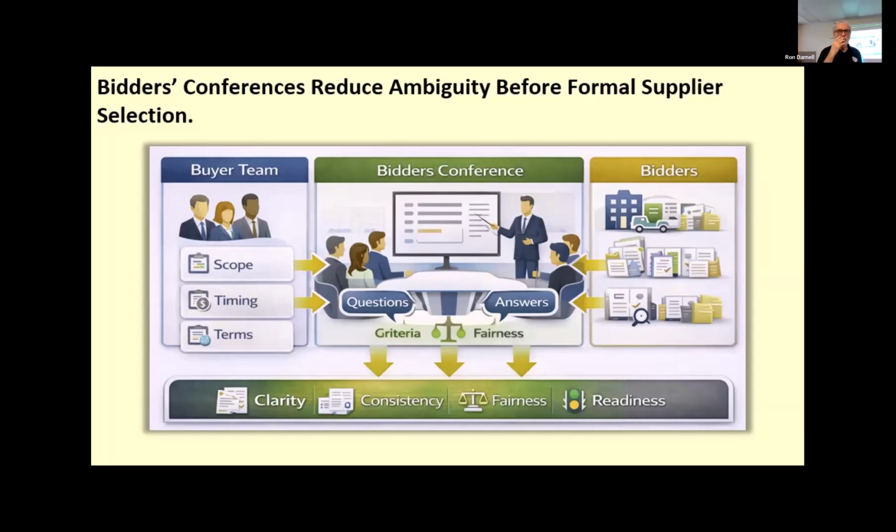The bake-off thing was nice in that they actually got working product. We each had a little different piece of the scope. So the electric company still got some working results after the end of 6 months, but then they selected the vendor that would carry them through. It was like a 5-year project, but it gave them the information on which company they thought best increased their likelihood of success. So this is a kind of thing that we don't really talk about much in a lot of the project management areas, but it's an important part of this.